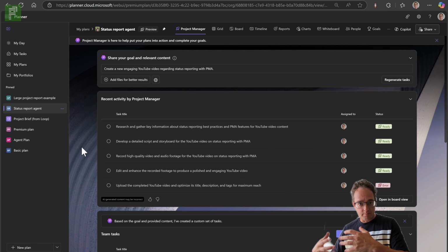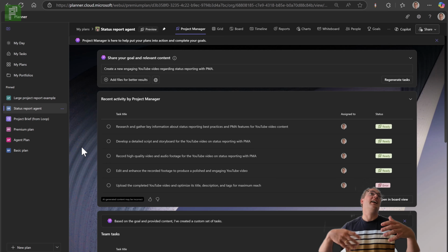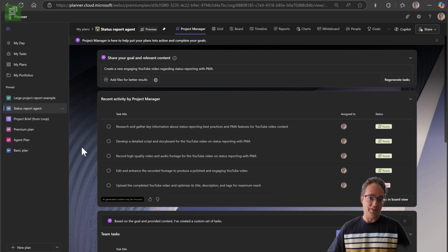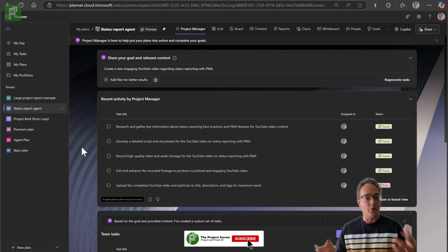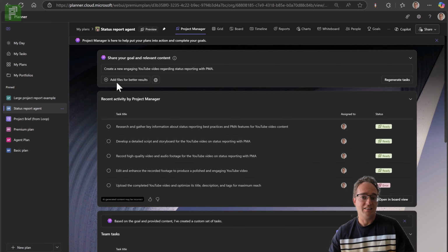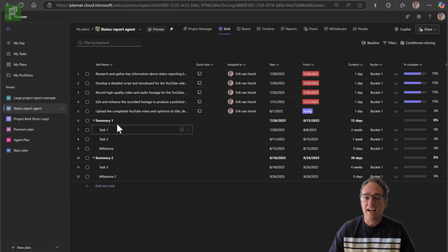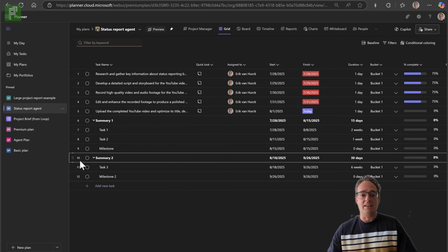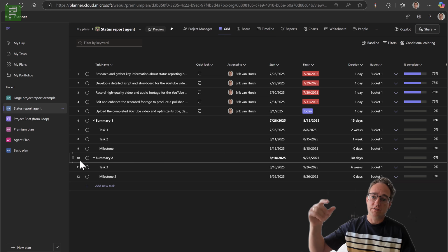Apart from that premium plan or plan with Project Manager Agent, you'll also need a schedule that has a certain amount of body, right? You'll need to have 10 tasks or it won't work. So generating this goal-focused automation process, as I've already presented in a previous video, doesn't cut it. There's just 5 scheduled tasks here. So for this very simple example, I needed to add additional tasks in order to make it cross the line of a minimum of 10 tasks.